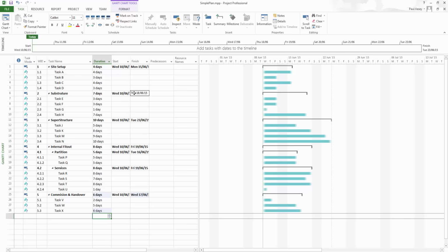If, for instance, I hard code dates against these and they miss or get started earlier or later, whatever, it's important to be able to track the knock-on effects of that, and we're going to see that in baselines at a later point. But if you're hard coding the start and finish dates without using the predecessors associated, you lose that opportunity, and you lose the opportunity to analyze the effects of any given delay or early start or whatever the case may be. So let's go ahead and do this.